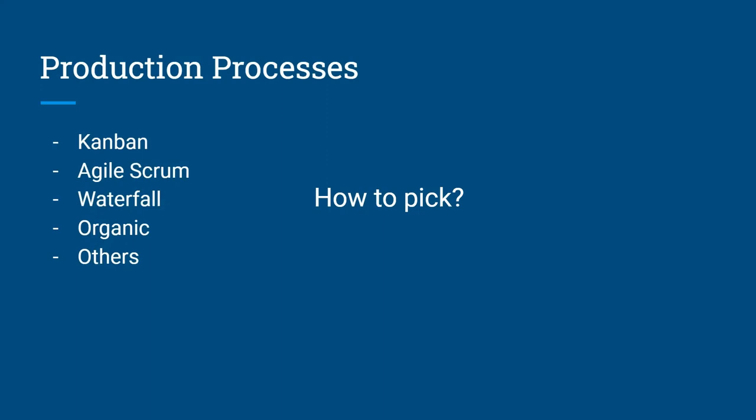It really depends on the situation. Each production process has its weaknesses, has its benefits. Some are more suited for different types of work. For example, waterfall is really good for tasks that have dependencies, very good for tasks that you can easily measure the amount of effort you need to create. And so our assets are really good with this production process. On the contrary, agile scrum is used for work that requires a lot of iteration, building upon changing user requirements. And this is what normally the tech giants use in their work. So very good for technical, very good for coding. Kanban is good for design just because it also has the iteration as agile scrum, but it also gives a lot of autonomy to your team and designers like that.